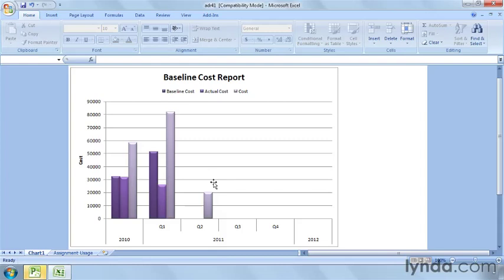A Visio-based visual report starts Visio and creates a Visio pivot diagram. The Visio file has one page for the diagram and a background page for things like logos. Visio-based visual reports break information down in a hierarchy, like a work breakdown structure. You can drill down level by level and use icons to highlight good, bad, and indifferent values.